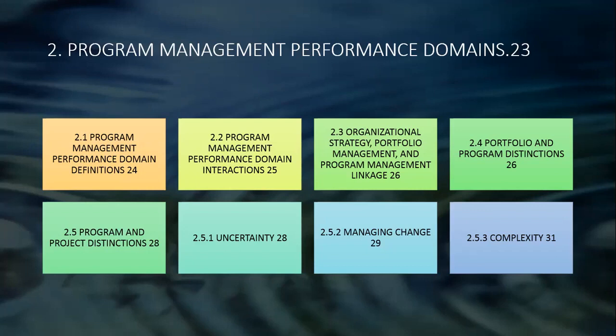Again, managing change could be a lot more complex. Program managers need to consider two different categories of change. These are internal change and external change. Internal change, changes within the program. External change refers to the need to adapt the organization in order for it to be able to exploit the benefits created by the program. So there's a lot more responsibility and burden on a program manager, and resilience is needed, leadership is needed, focus is needed, analytical skills, a lot of stuff is needed when you're dealing with change of this magnitude.